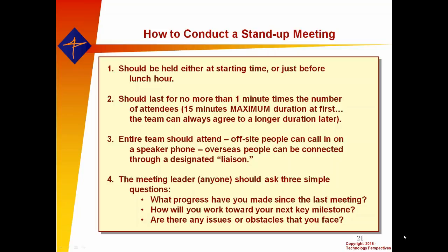It does me no good as a team member or team leader to find out after you've already slipped the milestone that you had a legitimate excuse. It might be legitimate, but I can't buy back that time and I can't fix it. On the other hand, if I know in advance that something's potentially going to cause a delay, I may be able to mitigate it. If I can't mitigate it, at a minimum, at least the team can plan around the slip and not waste their time expecting something that won't be there.